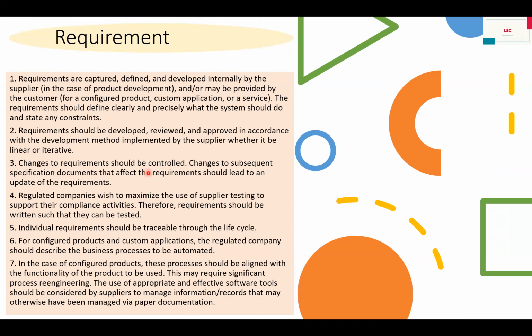Right? Now, third, changes to requirements should be controlled. This is part of the QMS also. Any requirement you are going to change should be controlled. Changes to subsequent specification documents that affect the requirements should lead to an update of the requirements. Okay, you need the update in any requirement.